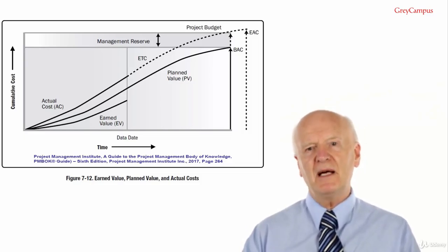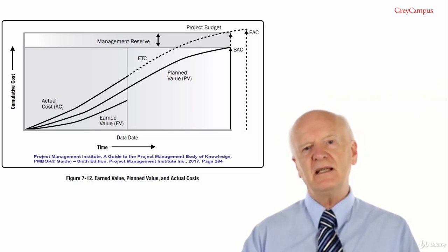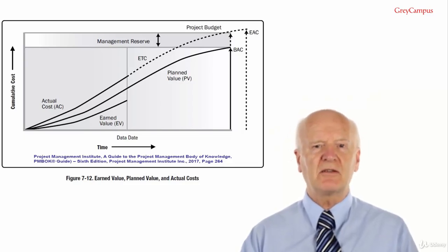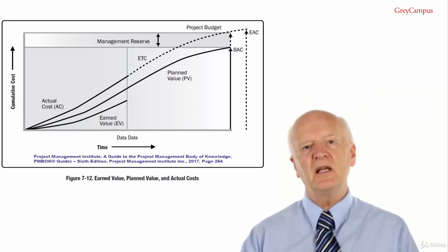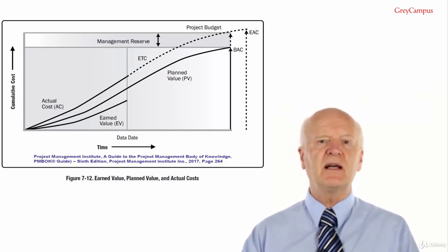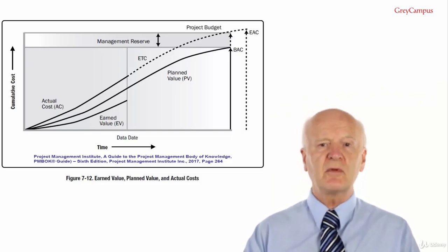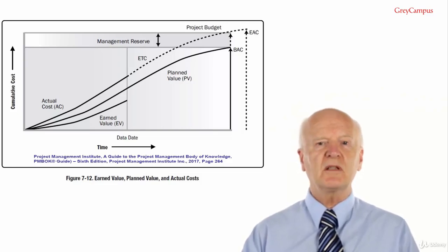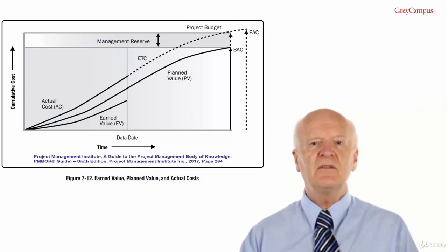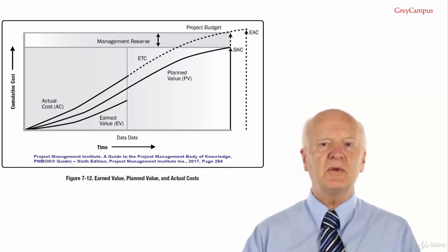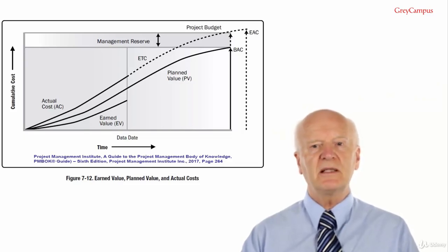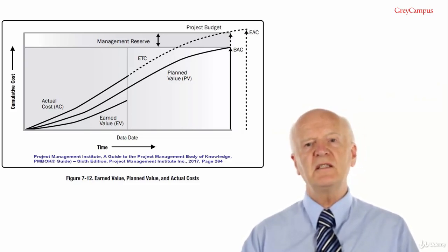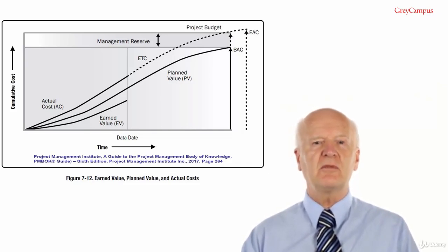The project manager's manual estimate to completion is quickly compared with a range of calculated EACs representing various risk scenarios. When calculating EAC values, the cumulative CPI and SPI values are typically used. The three most common methods are as follows, and this is from the PMBOK Guide, page 365. EAC forecast for ETC work performed at the budgeted rate. This EAC method uses the actual budget performance to date as represented by the actual costs and predicts that all future ETC work will be accomplished at the budgeted rate.